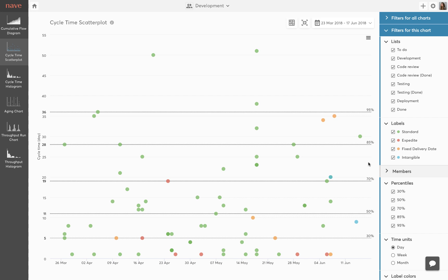For example, the 85th percentile indicates that 85% of the tasks have been completed within 28 days. This means you can commit that any future task has an 85% chance of being completed in less than 28 days.